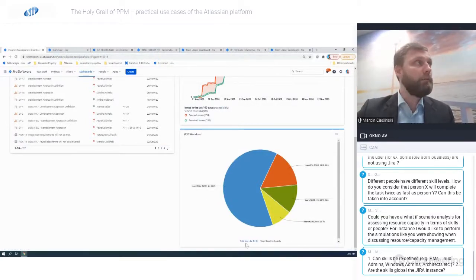And obviously, I want to minimize the total time. So if I see 4 weeks, 1 day, and 2 hours total time of work in process, I'm probably going to talk to my teams and try to figure out, okay, can they actually start closing those issues? Because we put in a lot of effort, but there is not a lot of value out of that yet, right? So probably I would talk to the dev team first, then I would talk to the PM team saying,